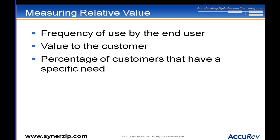Some ways of measuring relative value to differentiate between features: What is the frequency of use by the end user? If one feature will be used by everybody and another by just one customer, do the one with higher frequency — it has the most value. You may need to look at the cost, and don't think of the business unit as the only customer — work with the business unit and ask, 'How often will this be used in the field? Help us understand that so together we can come up with the ROI.'